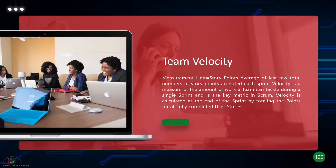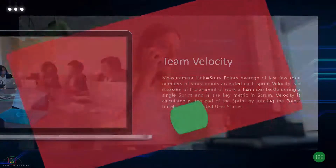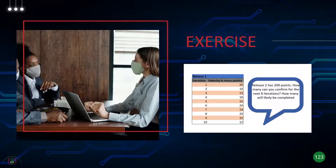If you find that the velocity has always been between 30 and 40, you should not commit beyond 40 or 45 story points. If you try to commit 80 story points, the team probably won't be able to finish. Conversely, if their velocity is 40 and you commit only 10 story points, you're under-committing and resources are sitting idle. Team velocity gives you a good measure for sprint planning.